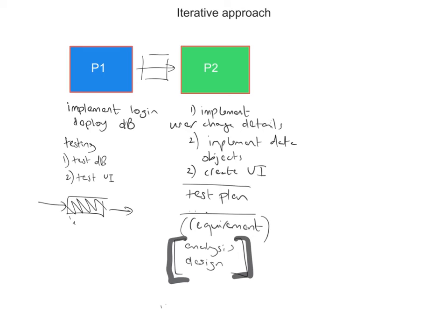One of the reasons to do that is because if you suddenly introduce something without giving it proper consideration, it can effectively perturb what you're doing and introduce defects later on which get much harder to fix. So it's just to make sure that if I've got something new to add in, if I introduce it, it's not going to have impact on other bits of my system, other bits of my code, and so on. But otherwise, it's absolutely no problem. You probably don't do too much of it, but if requirements suggest themselves as you're going through this process, then that's fine.